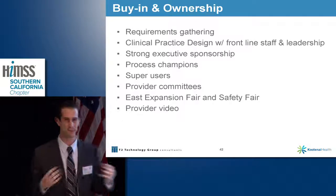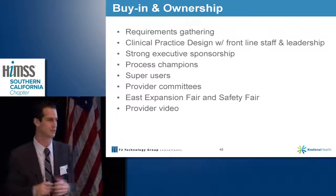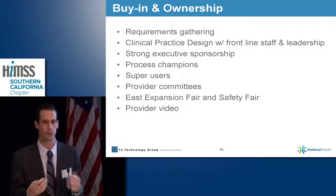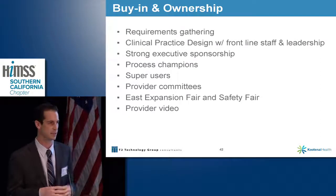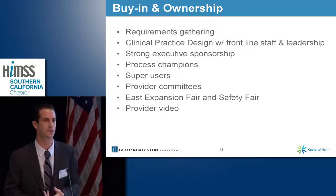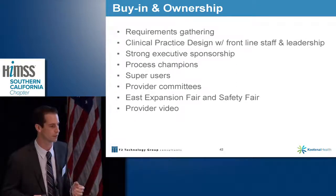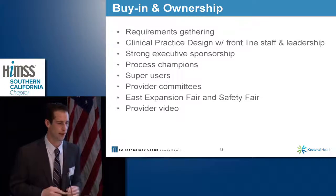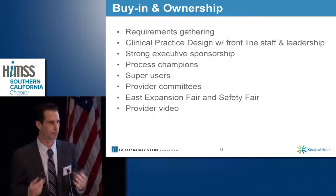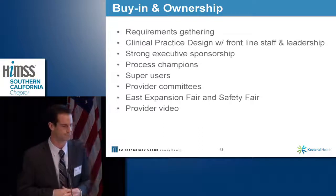That started just in the very beginning, gathering requirements about the system. We included every department that could possibly touch it to make sure that we were hearing what they would want to see in it. We then did our CPD, our clinical practice design, included frontline staff as well as leadership. We had the whole mix. And that wasn't just nursing, it included other departments as well. We had that sponsorship from the executive leadership. We had our super users who were out there helping nursing, asking, "Hey, do you need any help updating your whiteboard with your next pain med or anything like that?"